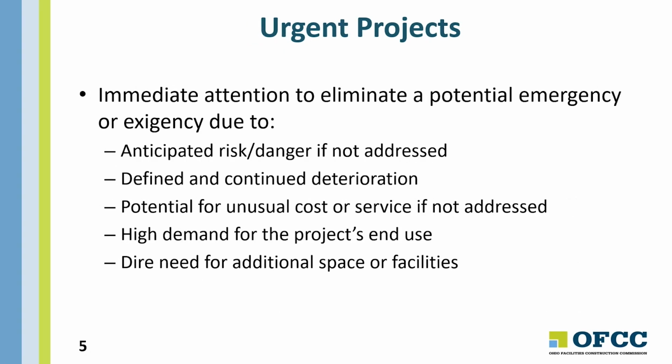And what that declaration does is it waives the procurement requirements for architects and engineers and also contractors. So it allows an agency, or OFCC on their behalf, or an institution of higher education to contract with those folks without getting approval by the Controlling Board ahead of time.